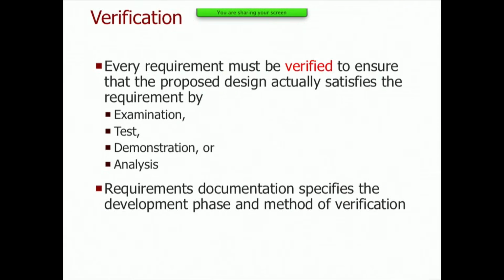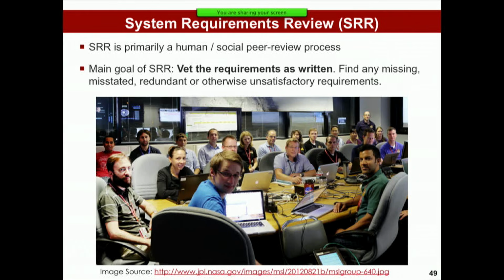So I'm going to skip this just for time, and I want to talk briefly about the SRR, what it is, and then kick off assignment 2. The idea is you've really been working on these requirements hard, as a team with your customers, and this is not a quick thing. This is not just 2 or 3 days. Typically, writing your level 0, level 1 requirements is a process that takes weeks, months, sometimes at least a year. But typically it's on the order of 3 to 6 months in many projects, roughly.